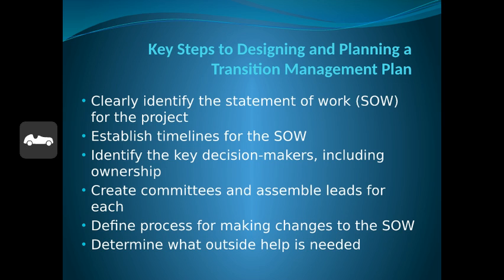A company first should create a leadership team who will be the final decision makers for the project. This includes any changes to the original scope, approval of change order forms, normally known as gatekeepers in the industry, and a final sign-off of accepted documents during project closeout. This same team will also be tasked with reviewing proposed transition items, the budgetary implications, and meeting updates with all involved parties.